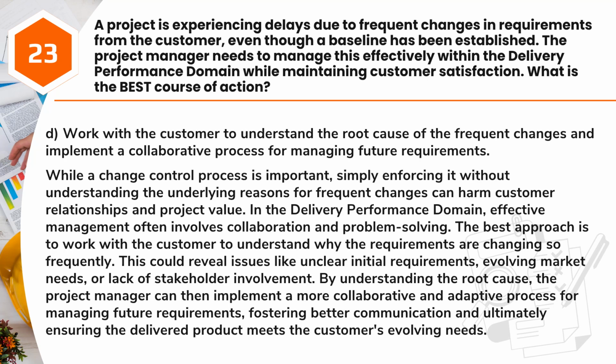Answer: D. Work with the customer to understand the root cause of the frequent changes and implement a collaborative process for managing future requirements. While a change control process is important, simply enforcing it without understanding the underlying reasons for frequent changes can harm customer relationships and project value. In the delivery performance domain, effective management often involves collaboration and problem solving. The best approach is to work with the customer to understand why the requirements are changing so frequently.